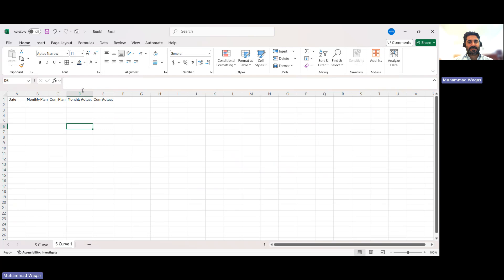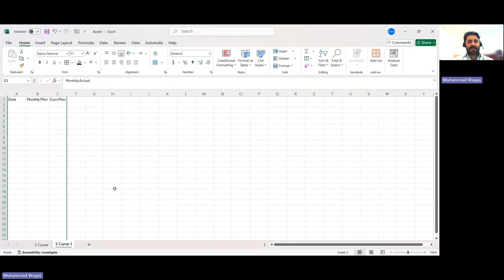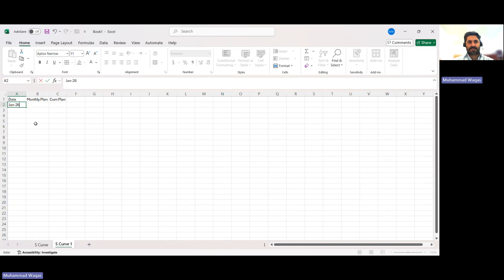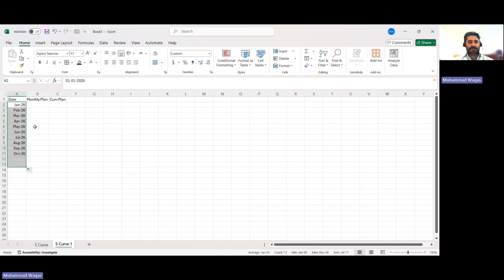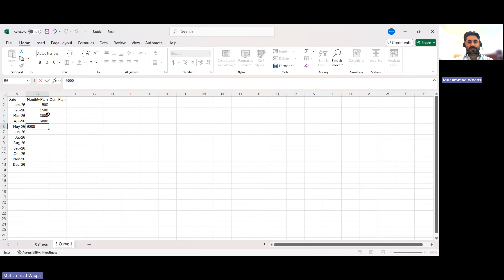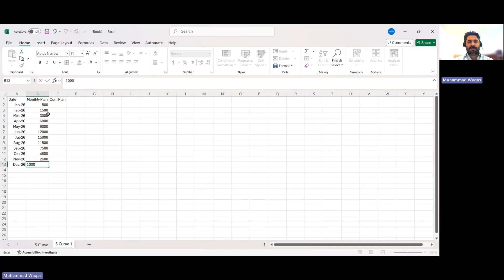Since I've just submitted my baseline and the project is starting, the monthly actual and cumulative actual columns are not applicable yet, so I will hide them and unhide them later. The project will start from January 2026, and I will drag the dates up to December. I'll enter the monthly plan data manually — you should normally get this data from P6 resource assignments. The values are: 500, 1500, 3000, 6000, 9000, 12,000, 15,000, 11,500, 7,500, 4,800, 2,600, and 1,000. Then I'll create the cumulative column using a running sum formula.